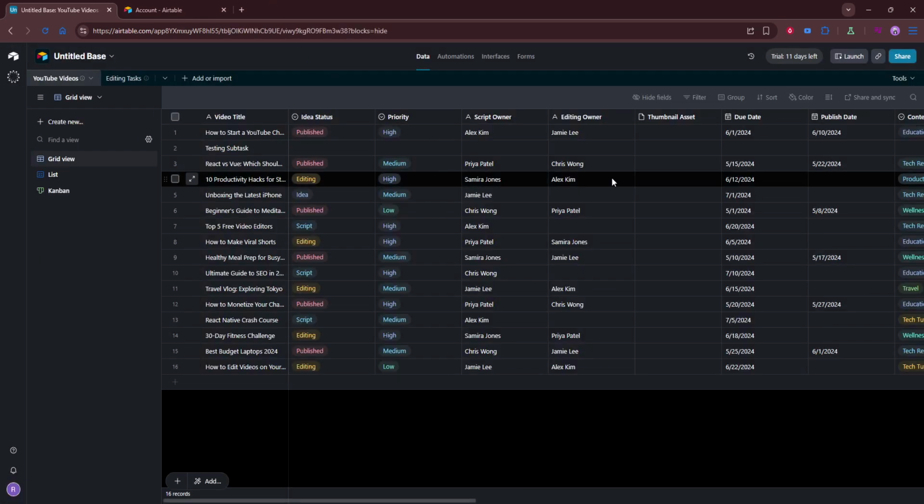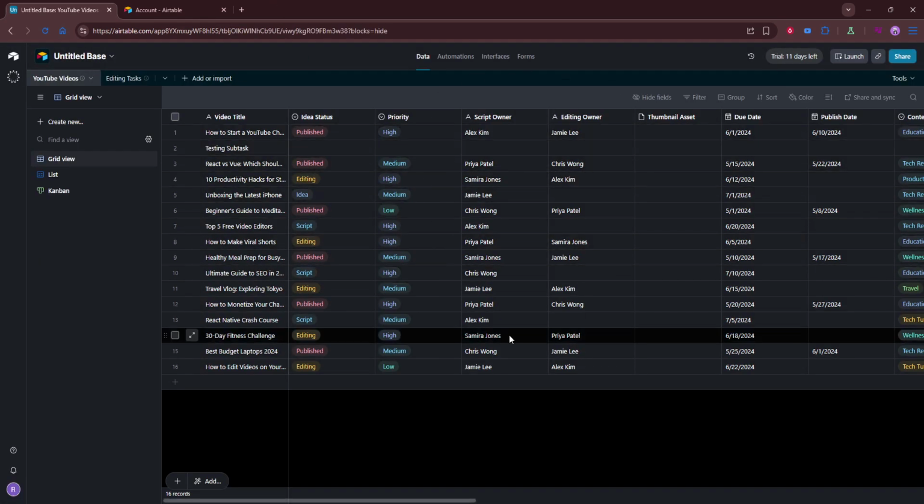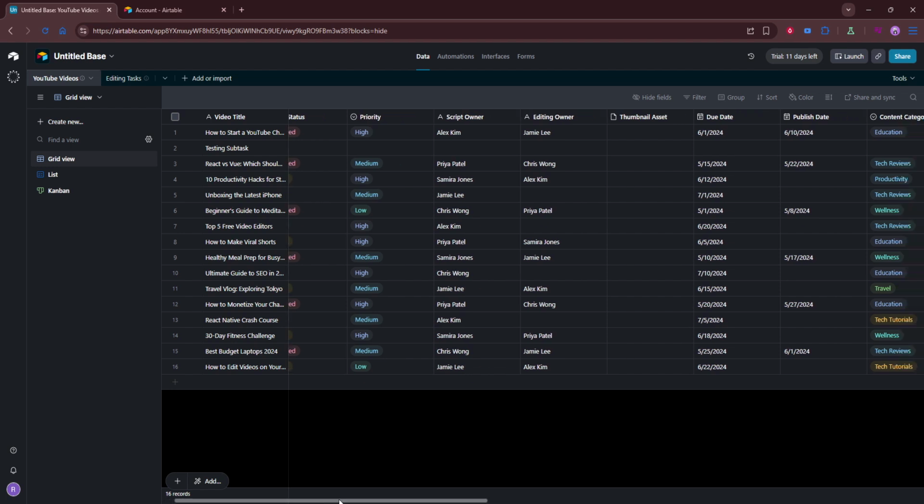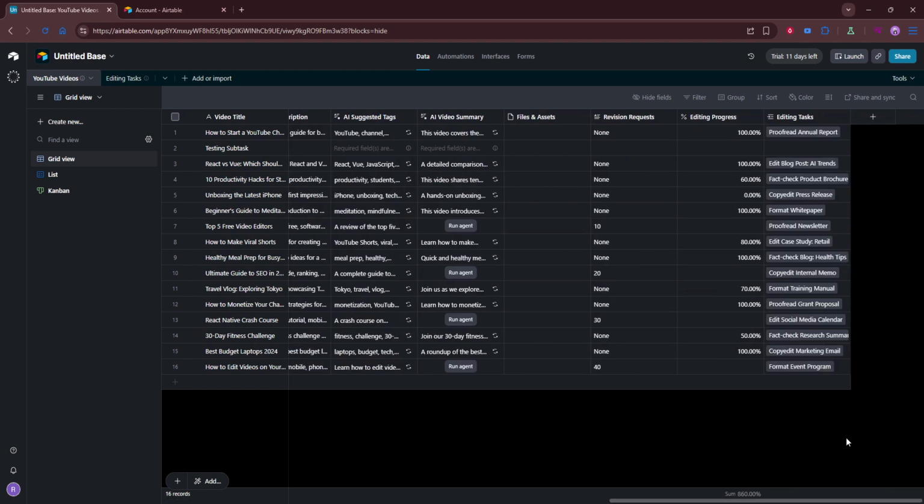Next, make sure your tasks include both a start date field and an end date field. These are essential because Airtable needs a beginning and ending point for each task in order to display them properly on a timeline. If one of these fields is missing, add it before continuing. It's also a good idea to make sure the dates are filled in consistently, since incomplete date information can cause the timeline view to behave unpredictably.